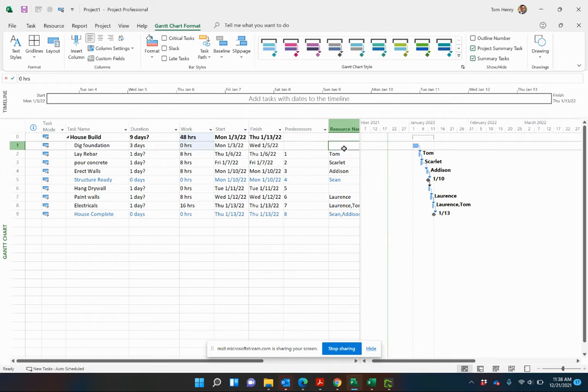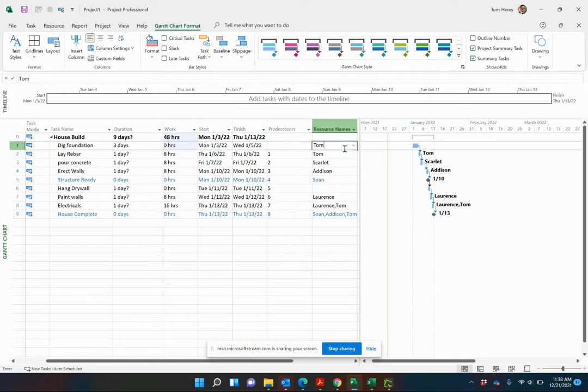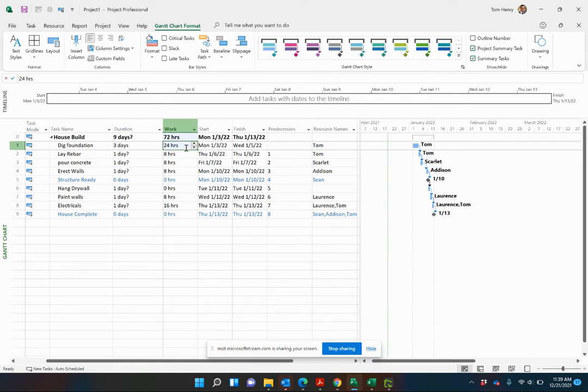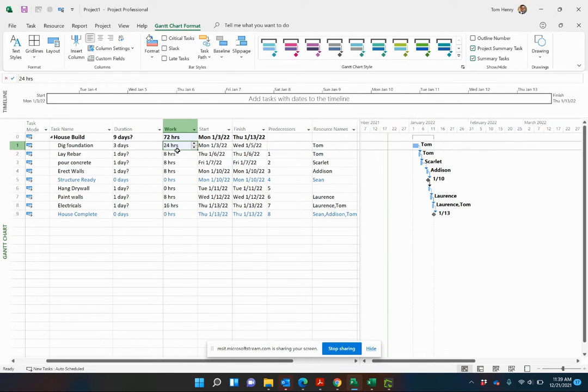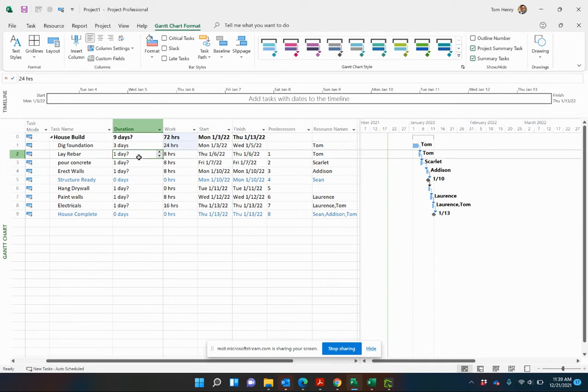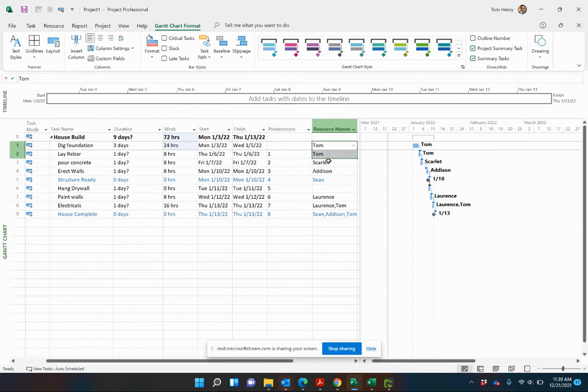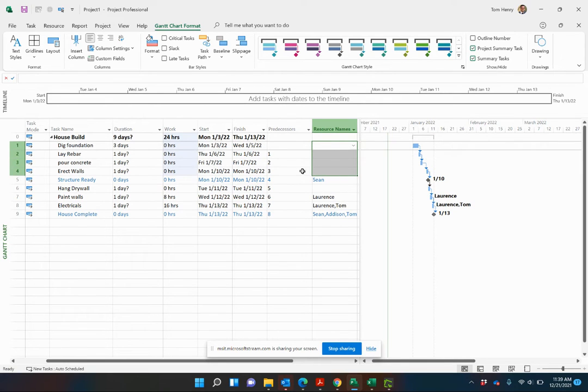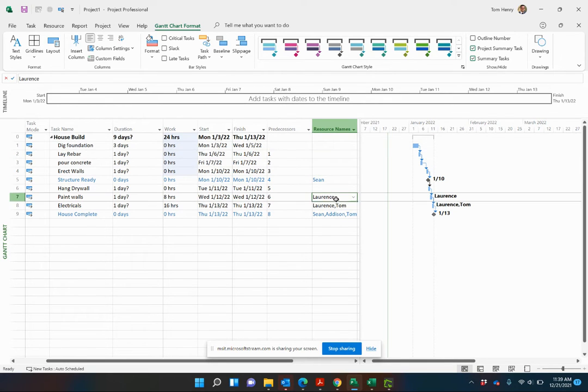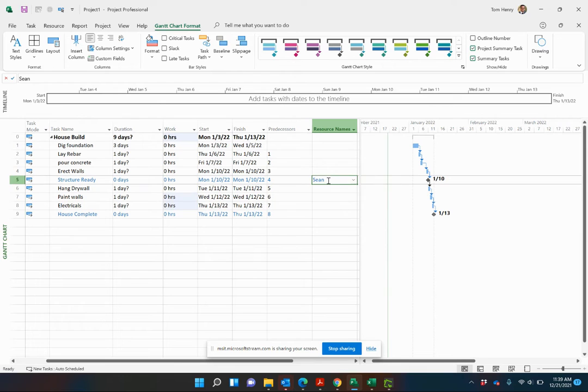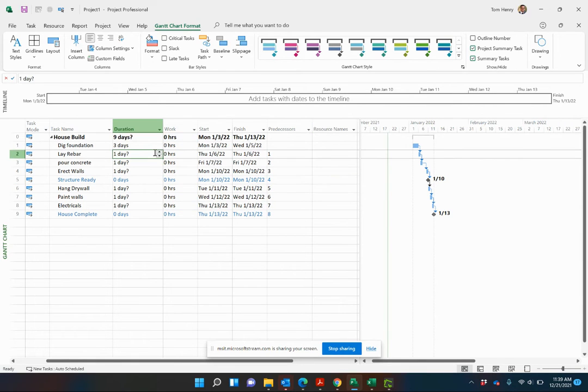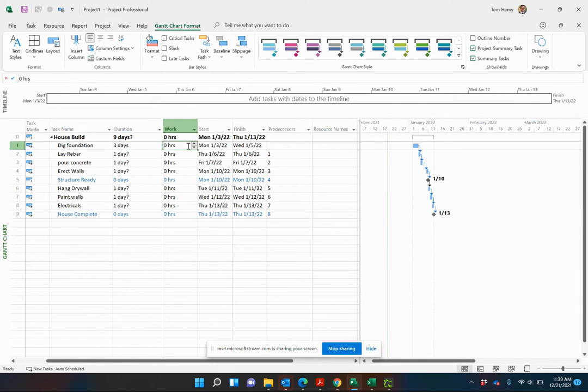So when we add a resource, by default, that resource is working full time on that particular task. You can adjust that if you like. So the work is calculated at 24 hours. When you're going through an estimating, you probably want to be doing this before you've even come in and assigned your resources. Let's go and remove the resources out.